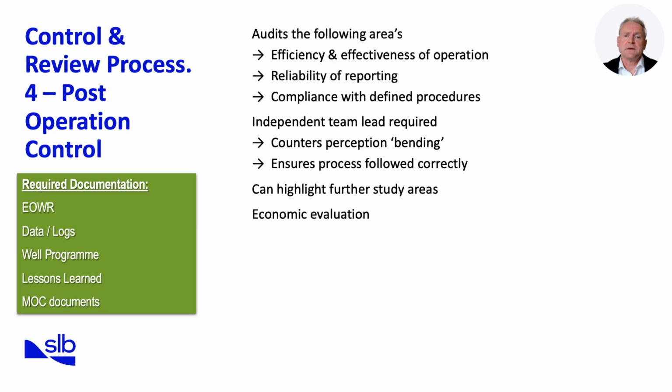The fourth and most comprehensive level is the post-operation control review. This takes place after an entire operation or well section has been completed and is designed to audit performance at a higher level. The review focuses on three main areas: efficiency and effectiveness of the operation, reliability of the reporting systems, and compliance with defined procedures.